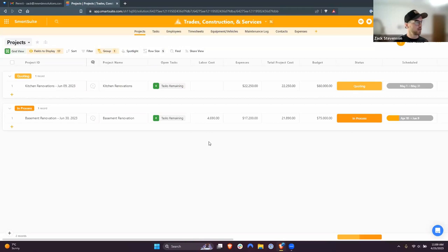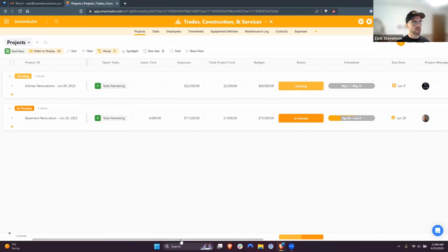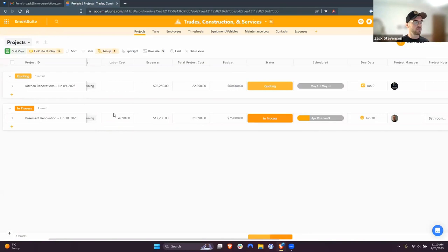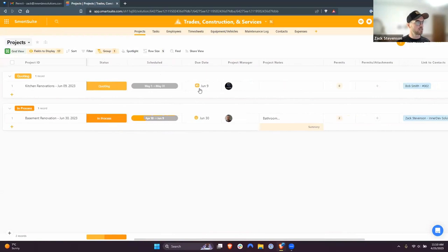The first app I'm going to show is Projects. I've kept it relatively simple, but here is where you can list each project and all the project-relevant information. Using formulas, rollups, and lookup fields, we're able to link to the different applications across the top. For example, if you want to price your labor costs because of all the timesheets submitted, you can see a live tracker of how those are being allocated to each project. When expenses get submitted, you can see those and how they're allocated. It can give you a total project cost to compare against your budget.